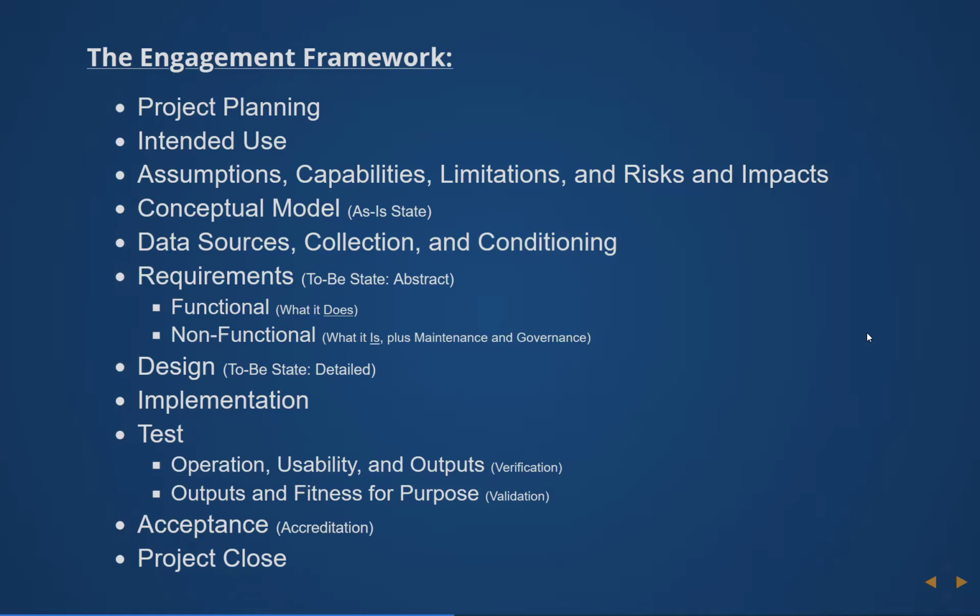One is verification, which asks the question, does the thing I just built work correctly the way I intended it to? The other half is validation, and that is about determining whether the thing I just built that works correctly actually answers the business or organizational need. Does it answer the question we originally asked?